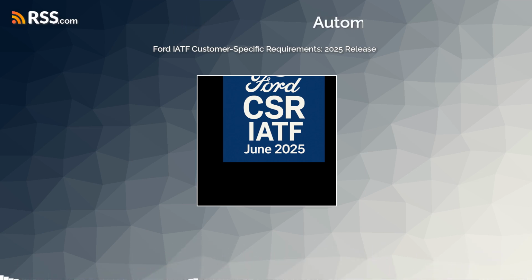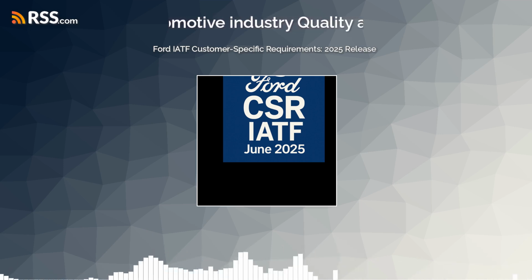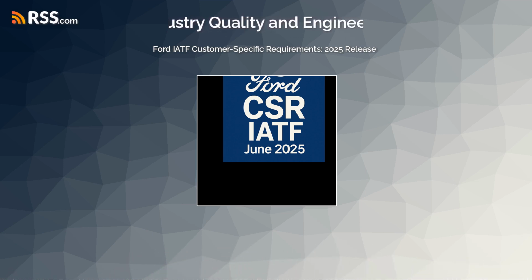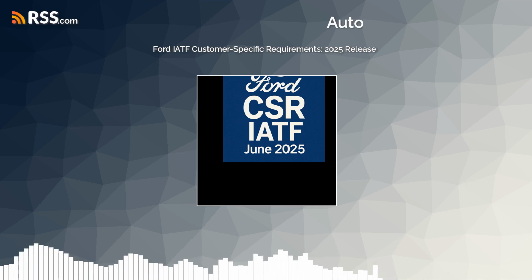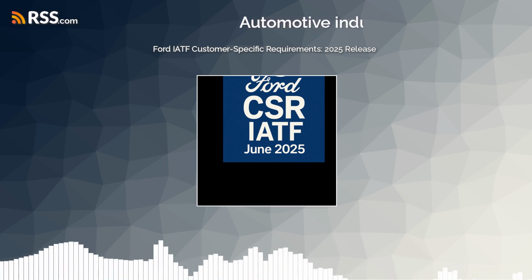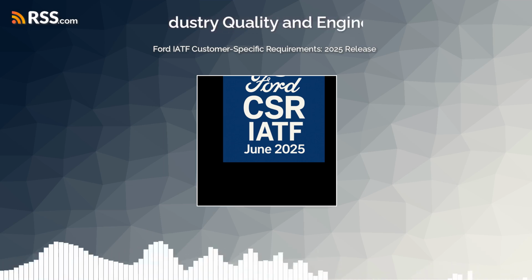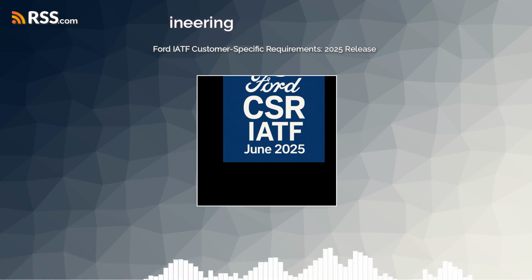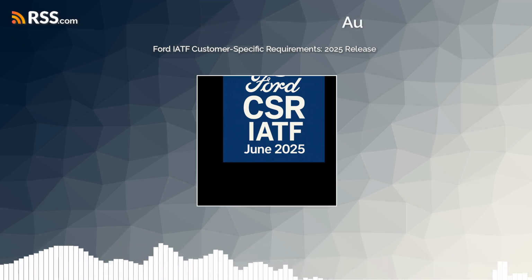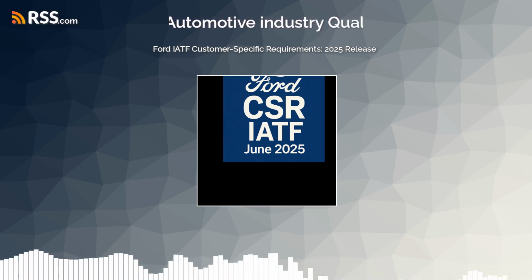What about sub-tier supplier PPAP? Does Ford need to see every single sub-tier PPAP package? That would be mountains of paperwork. No, thankfully. The document clarifies that for sub-tier component approvals, a summary is generally sufficient for the submission to Ford, for example, a list of approved PSWs from the Tier 1 sub-tiers documented in the APKey PPAP Evidence Workbook. Okay. The primary responsibility for reviewing and approving sub-tier PPAP remains with the direct Ford supplier, the Tier 1.